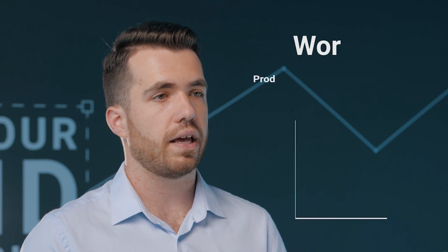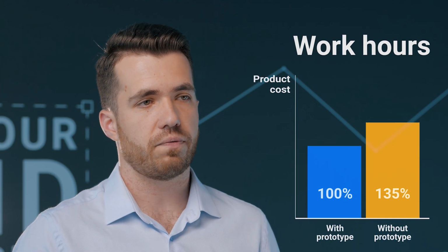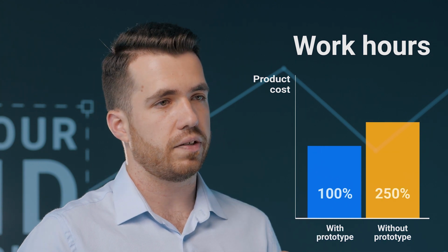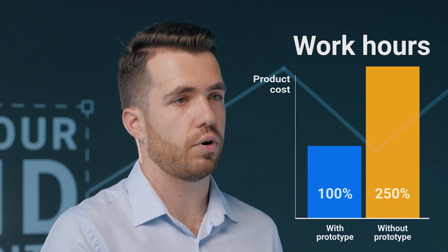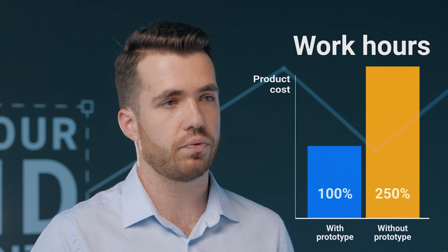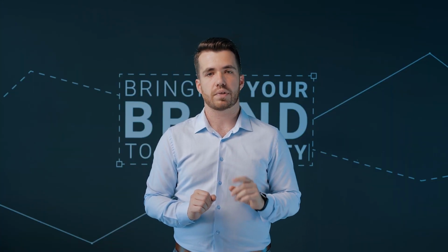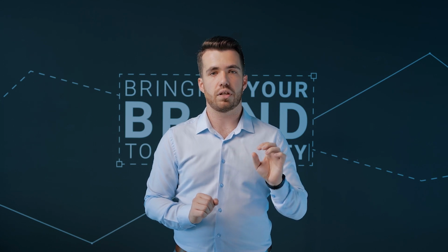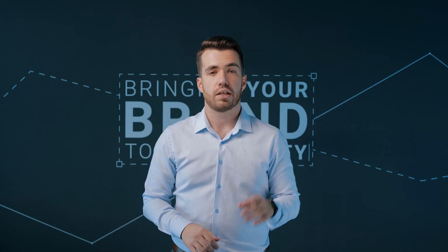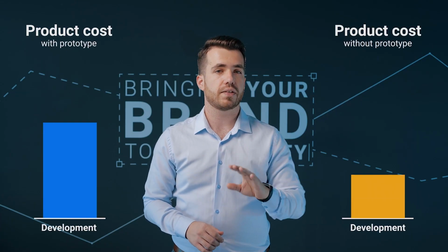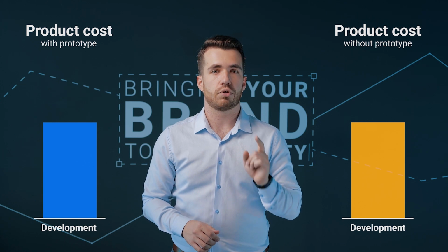If we take a look at only the financial part of the project, we can immediately tell that starting the development process after the design is approved costs more than if we would invest in a prototype. That's because any changes in the development process can take up more time and effort to correct than it does in a prototype. Don't get me wrong, you won't spend less on development with a prototype, but you will save the extra change requests that raise the costs of the final product.